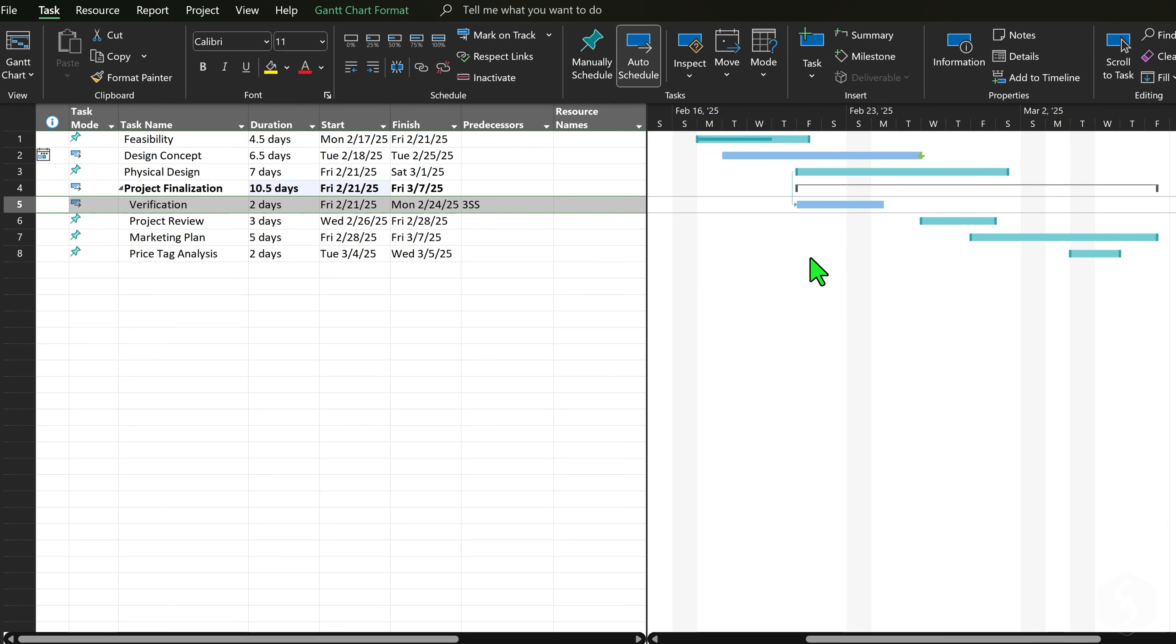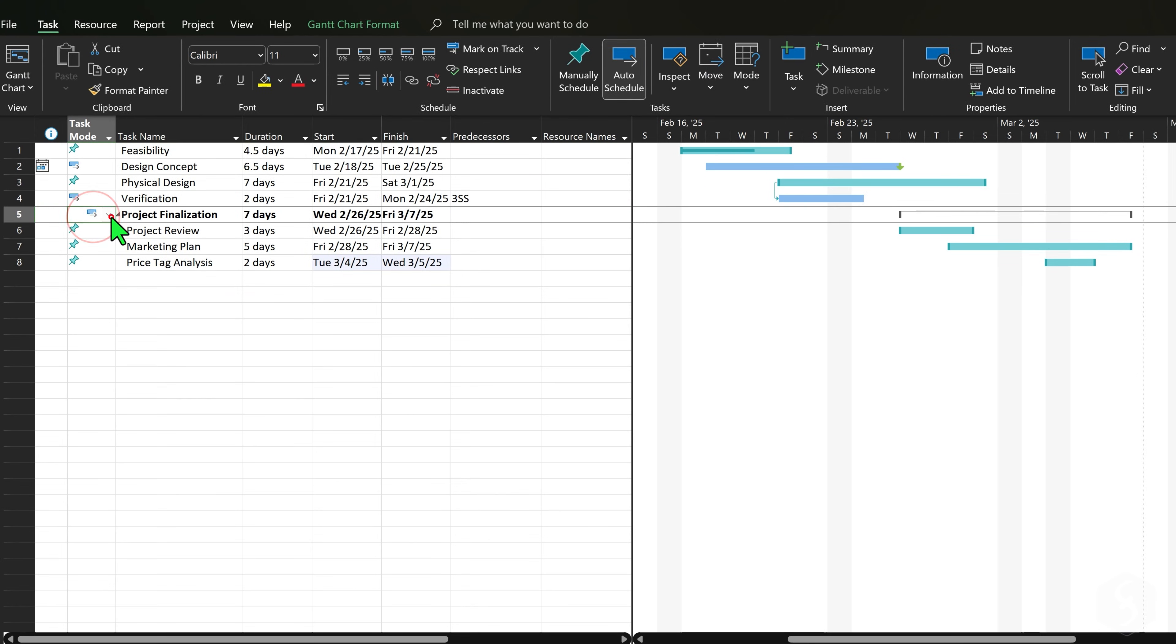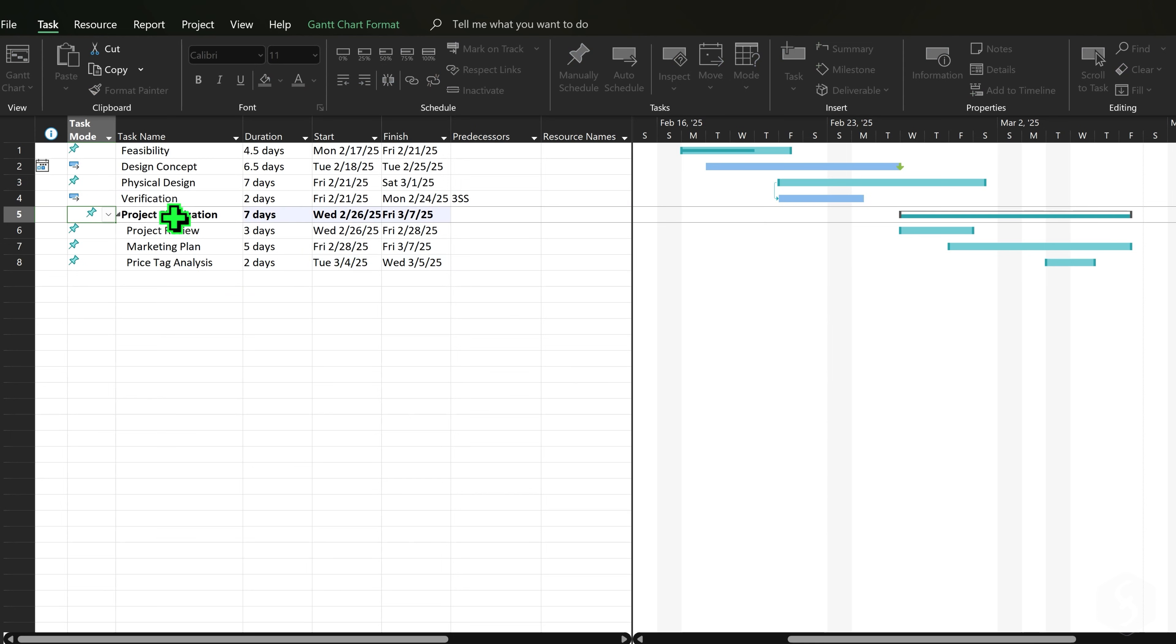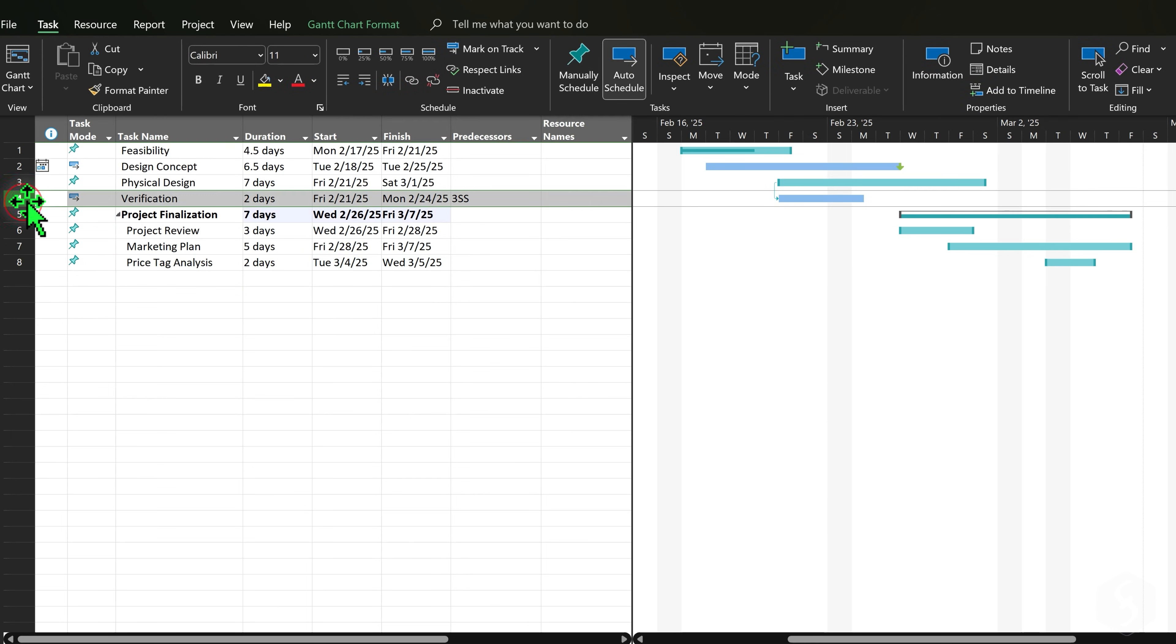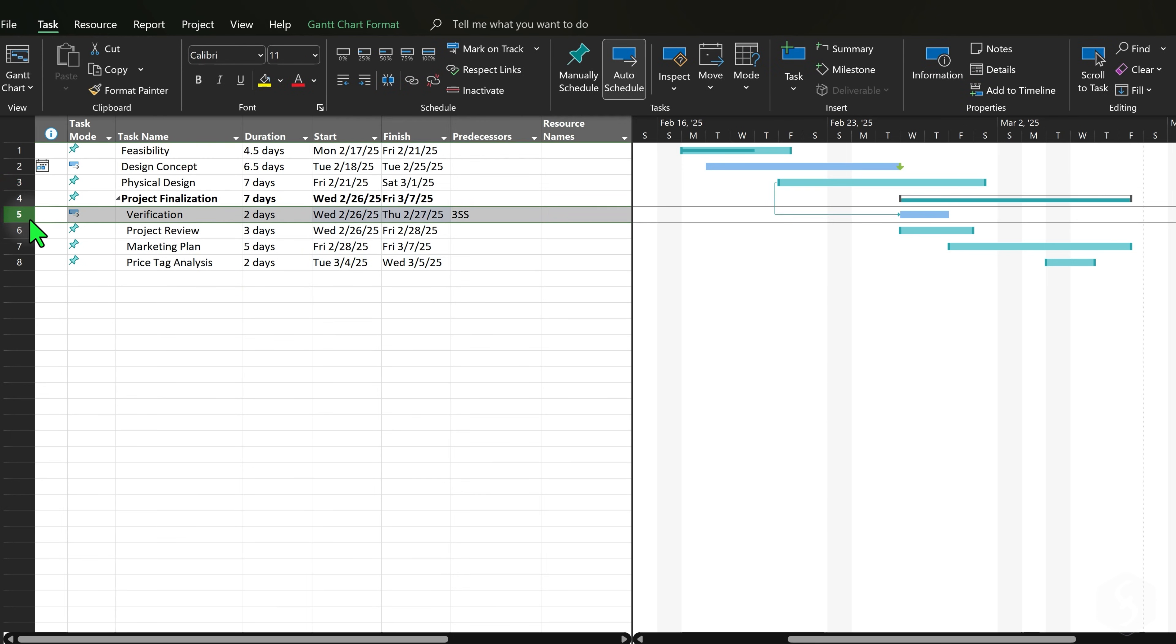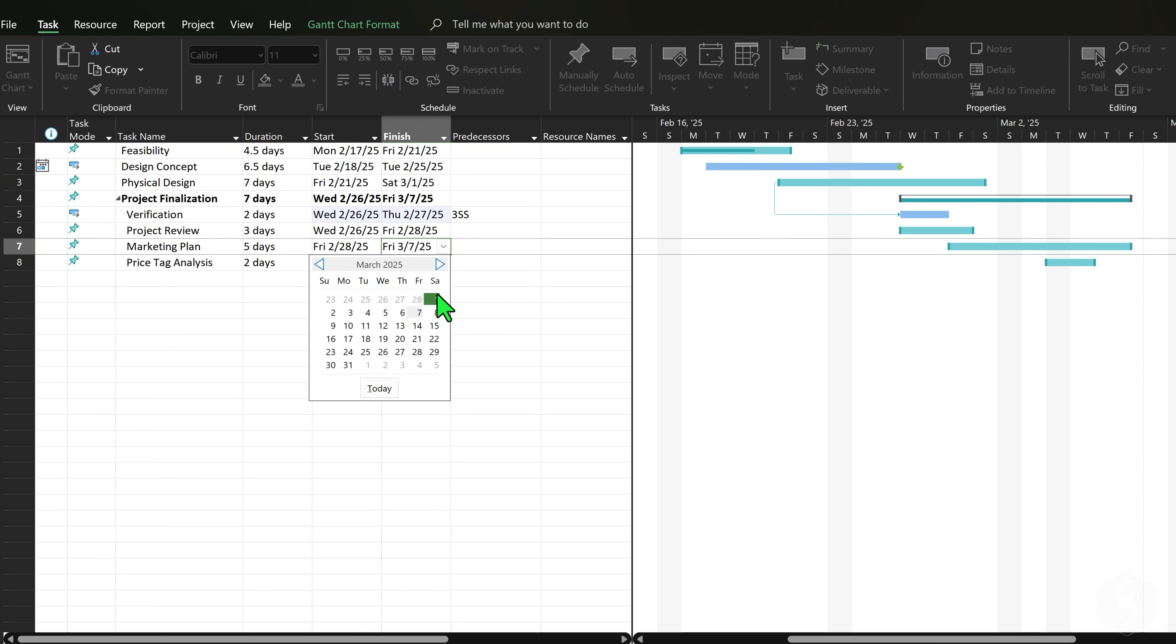On the Gantt chart, auto-scheduled summaries extend or shrink automatically to collect all tasks within. Manually scheduled summaries can be freely extended in time, as long as they fully contain all their inner tasks in time to avoid errors.